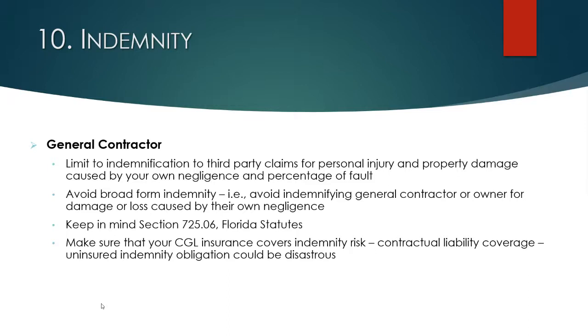And then, as we discussed, and this is really, really critical, make sure whatever you end up agreeing to as far as indemnity, you show that to your insurance broker and make sure that you have insurance coverage in place to cover that indemnity obligation. Typically, that's referred to as contractual liability coverage. What you really don't want to have is an uninsured indemnity obligation, because that indemnity can last for a long time, even after the project's completed, and a claim could be asserted against you even years down the road. If you don't have insurance coverage, it could be potentially disastrous depending on the size of the claim.